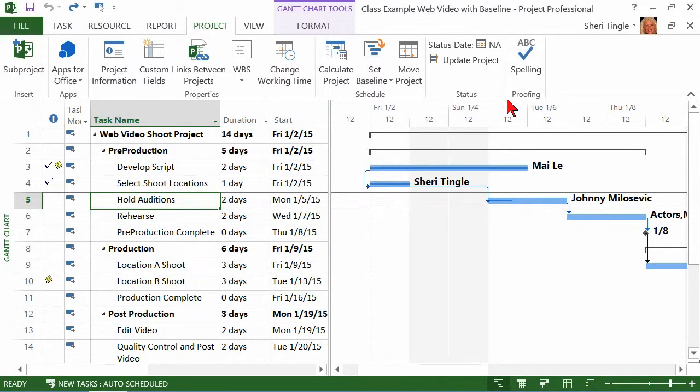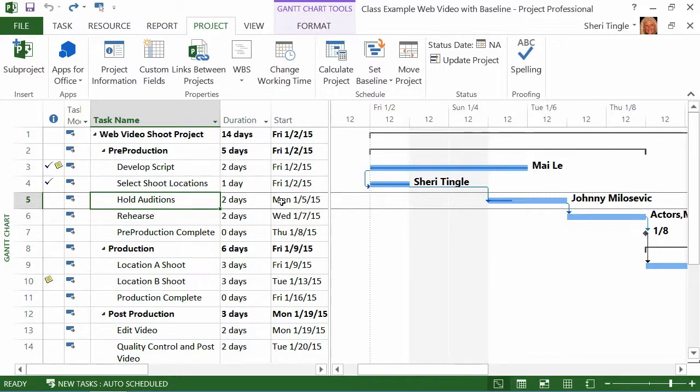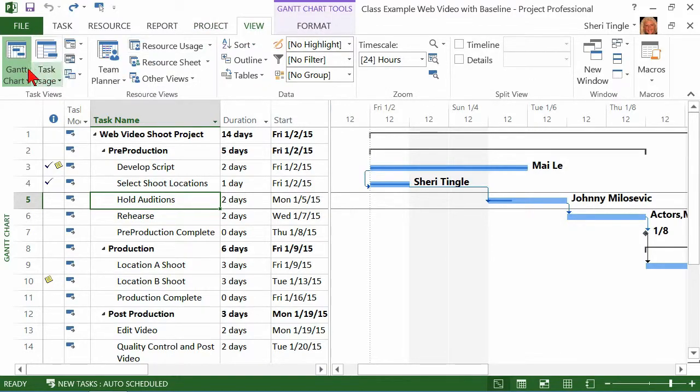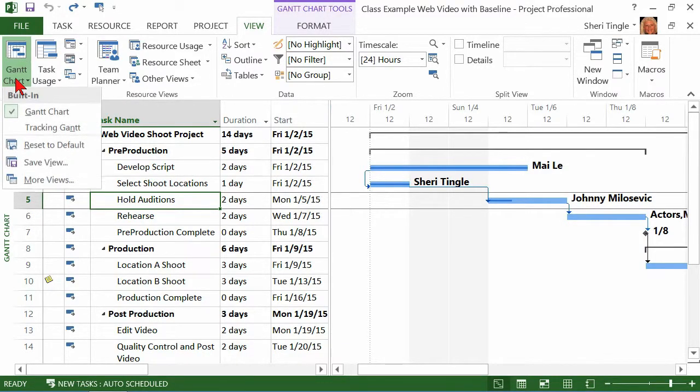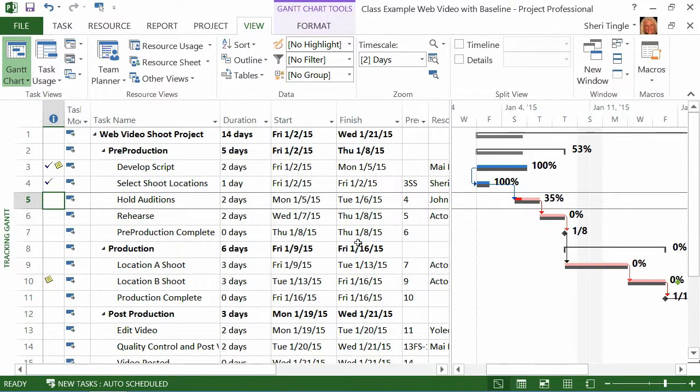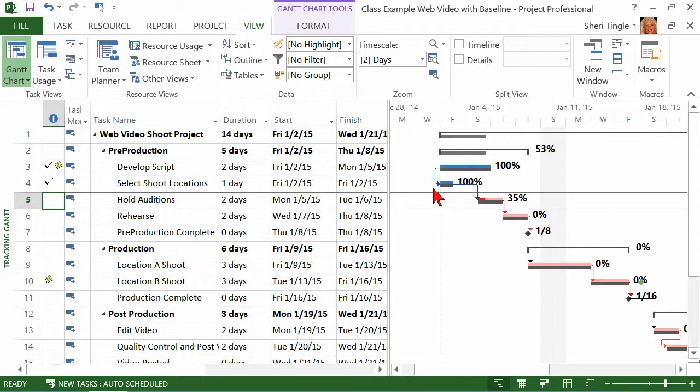Go ahead and close that. Well, maybe you'd rather have cost right here on your page, right here on the screen. This is such a great little trick. This table right here is the data entry table. But you can actually change the view of just your table. Well, you already know that you can change your view over here. You can switch over to the Tracking Gantt if you want to be tracking what's going on with your project. Oh, hey, I'm doing pretty good. I'm still on my baseline. And since this item is no longer critical, it's finished. It's not red. It turned to blue. All the rest of them, they're still critical. Still need to get those done. So I can look at this view. You already know that.